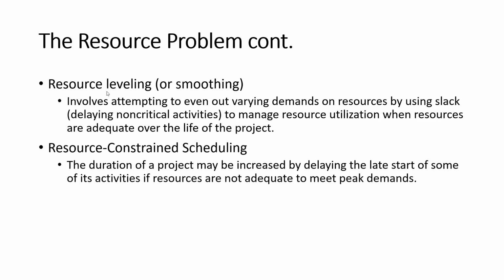Right. So resource leveling can be done as well as the resource constraint schedule. In a resource constraint schedule, we are having some peak demand time. In those peak demand times we do not have enough resources to meet that peak demand. In that case, we can delay the late start time of some of our activities, right? So likewise, like the student who asked the question and asked me to explain that again, if you are not clear about what I am explaining for you, please feel free to ask, right?